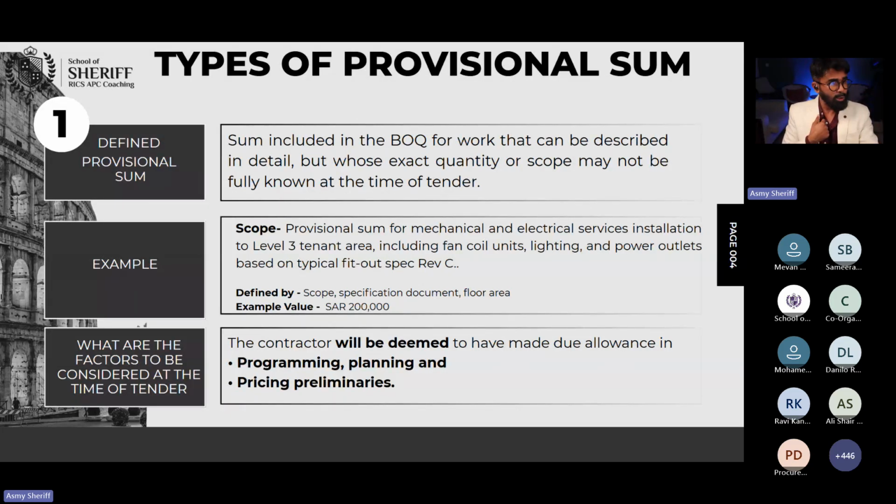So this contractor, as an experienced person, should anticipate that this is an additional 3,500 square meter two-story building. The client may go for it. He gave enough information for me to anticipate that. So I identify that this requires another 90 days, or maybe let's say 200 days. I'm going to construct a mall here. In front of the mall, I may construct this mock-up building.